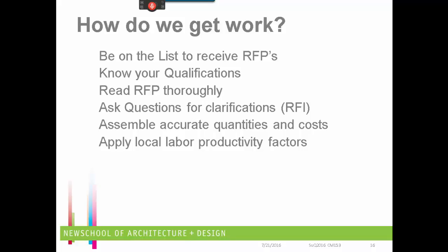We ended up having to reach out all the way up to a contractor who was up near Green Bay, who made the decision to bring his crew down. We provided housing for the crew, and they were able to do the work at the 300 per day per man productivity rate. But understanding how productivity affects the schedule time for the number of masons that need to work to get the quantity of stuff done.